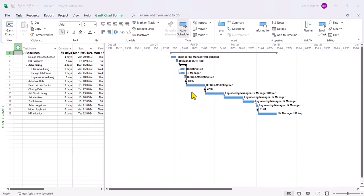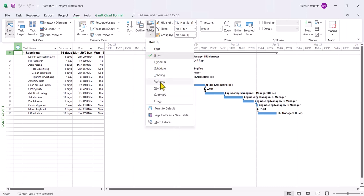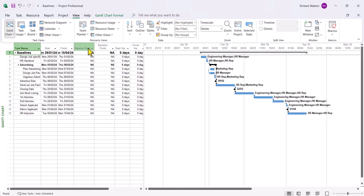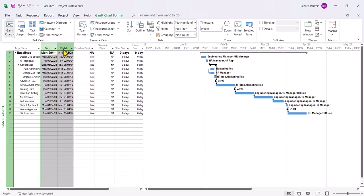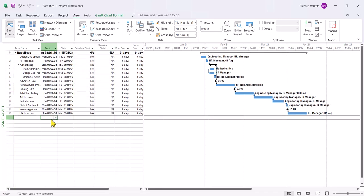Now there's two tables which are useful to see whether a baseline has been set or not. We're first going to go to the what's called the variance table on the view tab. And if we ever see NA, that means no baseline has been set. So what will happen when I set a baseline very shortly now, the dates in the start and finish columns will populate the baseline start and baseline finish in effect like a copy and paste because this is what we're agreeing to. We're agreeing to these dates. This is one table where the baseline is going to be implemented shortly and NA means no baseline. So I'll show you another table.